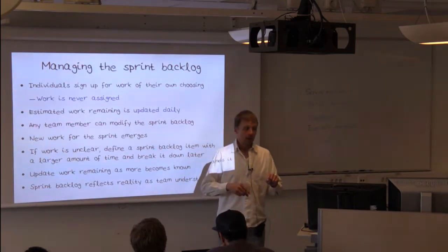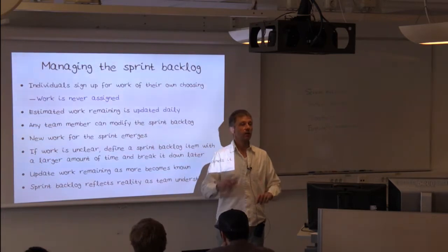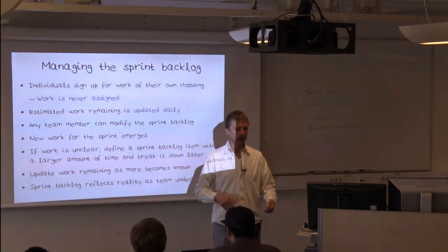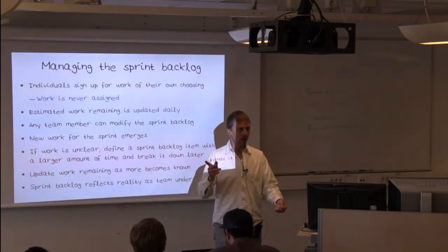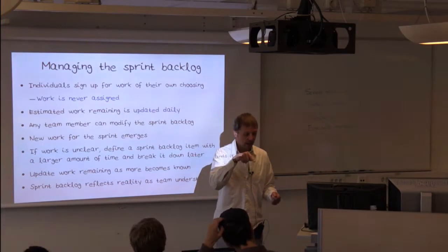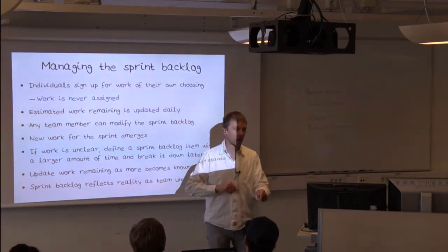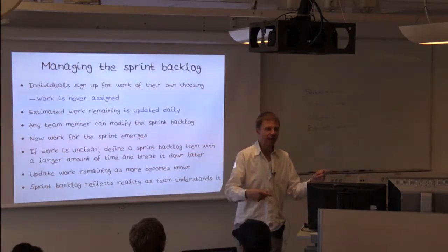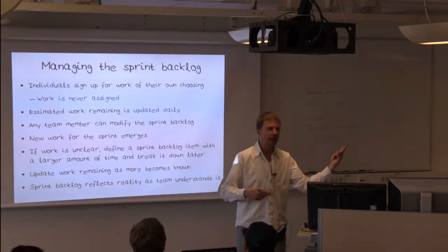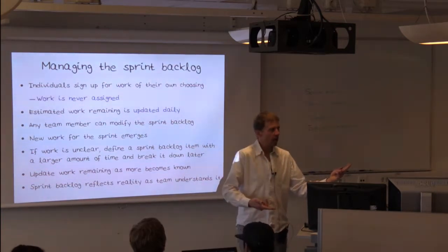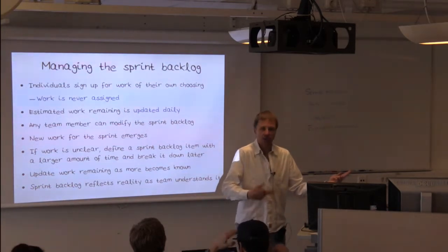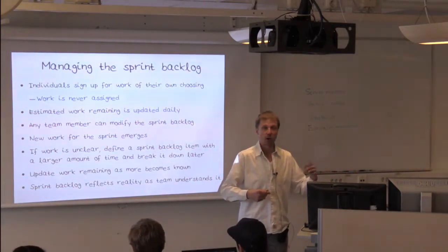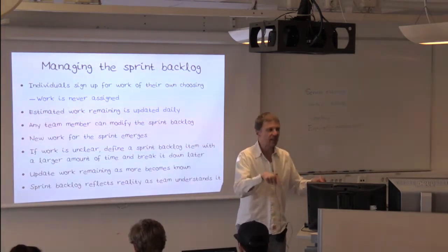At this point in time, you might have put in, say, 2 hours into this task, right? It started as a 4-hour estimate task. After putting in 2 hours and logging out with the plan to continue tomorrow, you need to update the remaining hours on this task. How many hours it started with is irrelevant. Because you might have noticed after working 2 hours on this that, oh shoot, we forgot these aspects. So it turns out that what I had initially thought was 4 hours, I have now become much wiser working on it for 2 hours. So now I realize 6 hours left. So the first estimate was wrong, irrelevant. I want to see 6 hours there.